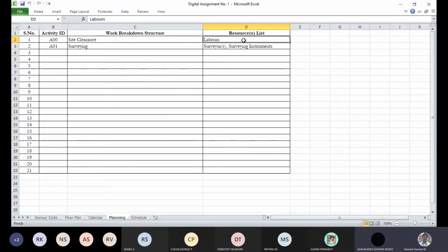And the resources list, like how many people are required or something like that. In the work breakdown structure, we'll be looking into what the probable resources required are. Say for this case, for the site clearance, I've got laborers. Also need equipment for clearing. So all these things are also required. Equipment itself is plural. Clearing, and probably can even take cleaning. All those things, right? So these are equipment and resources. So resources look into not only people but also materials.